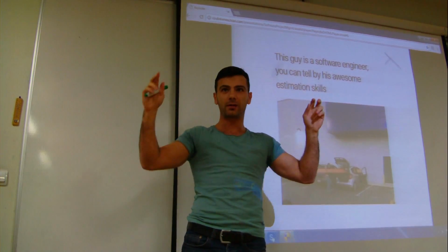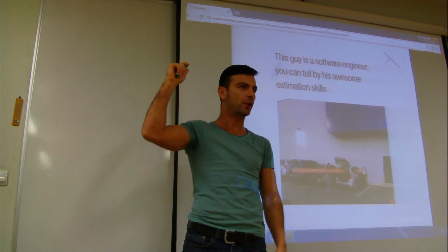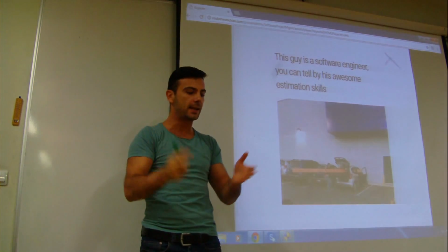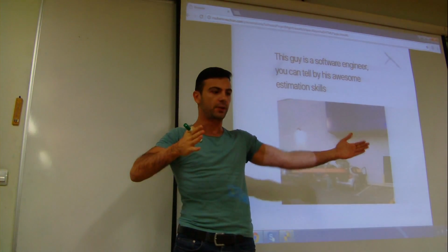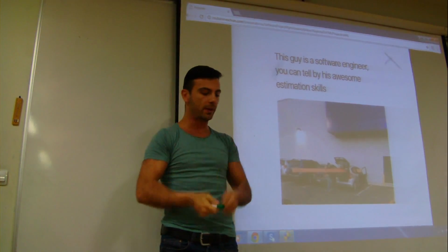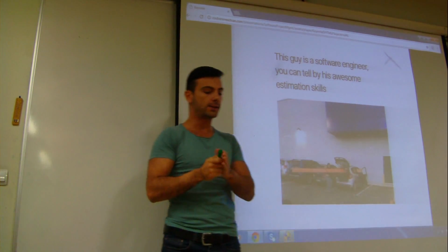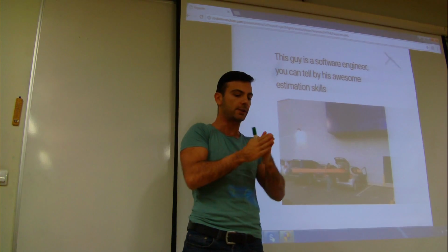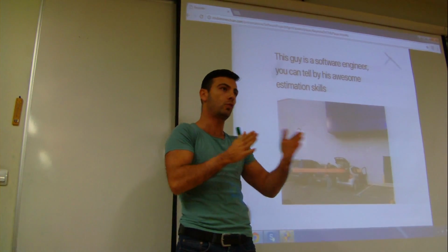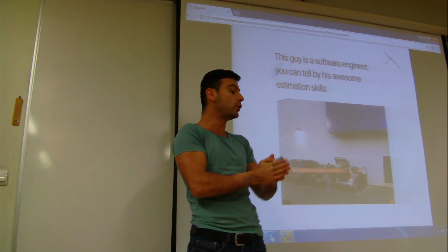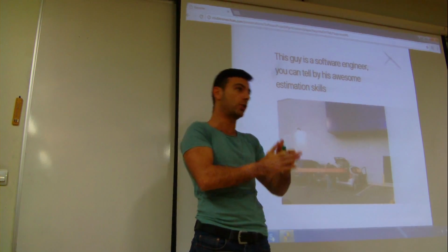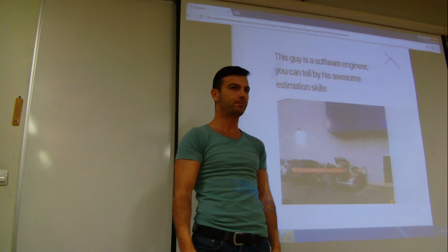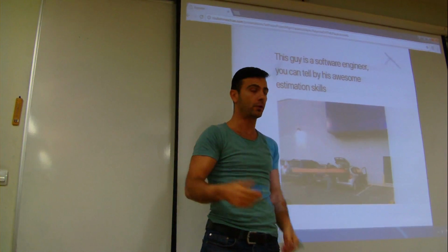You guys heard of Agile, this whole notion? Yeah, hands up if you know Agile. Ooh, some of you. Okay, cool. So the idea is basically to break up your development process, not into we build it and then we're done. No. It's we build it, design it, test it, whatever, go through this whole process in one sort of sprint in a 2-week or 3-week section. And then you do another section, and you keep doing this until hopefully you see the carrot at the end. This is the process of Agile, okay?